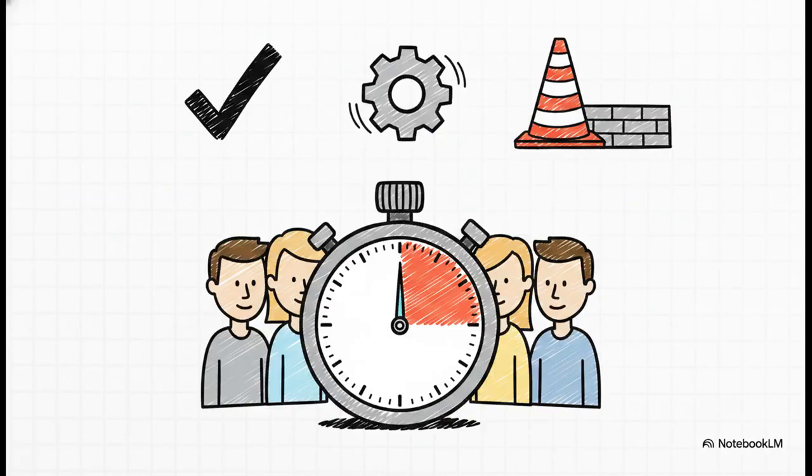To keep your team completely aligned and focused during that cycle, you're going to hold daily stand-ups. And listen, these are strictly time-boxed to 15 minutes. No exceptions. Every team member just answers 3 critical questions. What did I complete? What am I working on today? And are there any blockers in my way? This is not a status report for management. It's a rapid coordination meeting for the team to improve visibility and solve problems immediately.